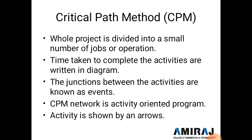In a CPM diagram, an arrow is drawn and the time duration is given above the arrow in the form of days, weeks, months, or years. Below the arrow, the activity description or name is given, like excavation or brick work. The junction between activities is known as an event, denoted by numbers like 1, 2, 3, 4, while activities are denoted by alphabets A, B, C, D. CPM network is an activity-oriented program.